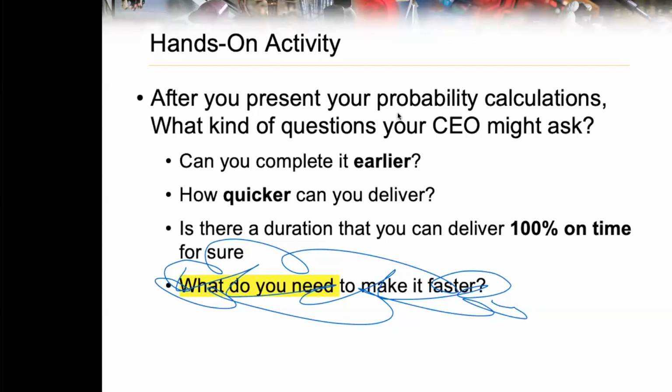Okay, it's what I told you in the PERT, right? When you are coming up with the durations of activities, please put in some buffer, because your manager will put in some buffer, and the company will put in some buffer. So you have your buffer built into your final delivery day. But don't tell others. Don't tell even your team. Maybe your team is okay, but don't tell others you have a buffer, okay? Because then people will eat up your buffer.